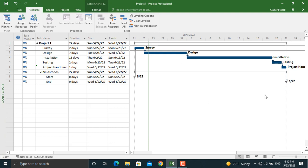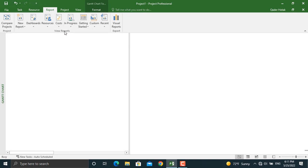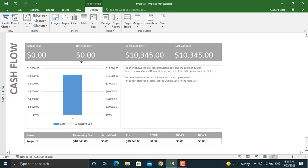Activity names will now appear on the Gantt bars. Once this is done, in the Report section you can generate different types of reports. For now we will focus on the Cash Flow or project cost report. Once you click Cash Flow, the report appears. Since we don't have a baseline and haven't spent anything yet, the actual and baseline values are both zero. The remaining cost is $10,345, and the cost variance is also $10,345 because we don't have any planned baseline cost yet.